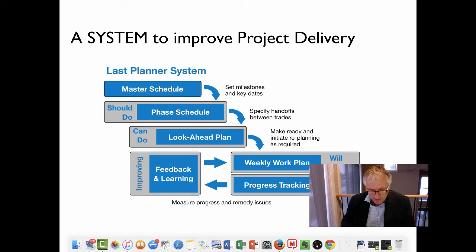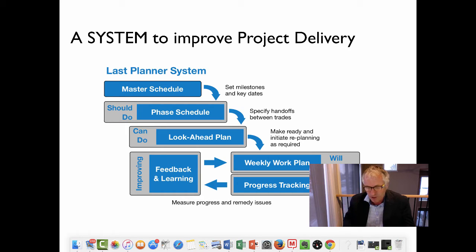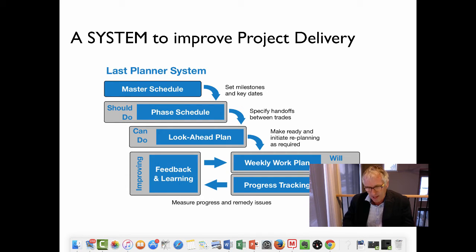The main project system is based upon multiple levels of scheduling and planning, including the master schedule, the phase schedule, the six-week look-ahead, the weekly work plan, and a daily plan when required.